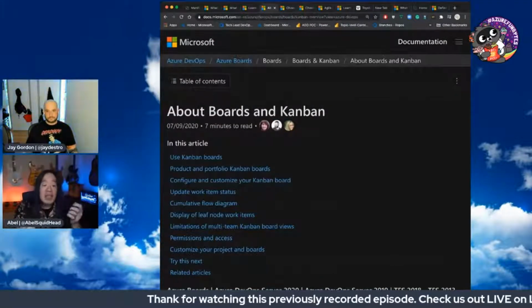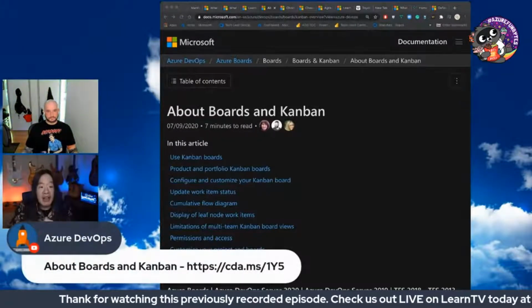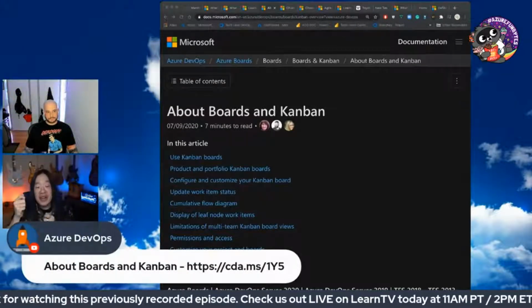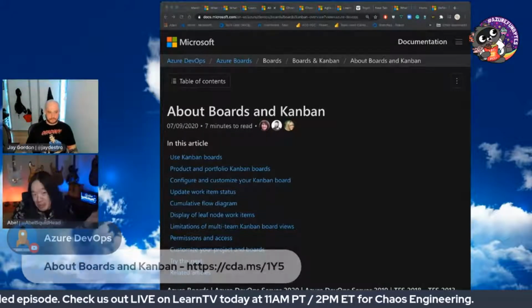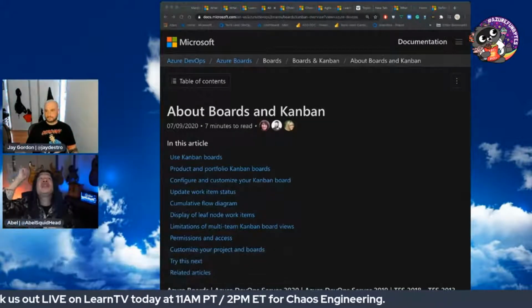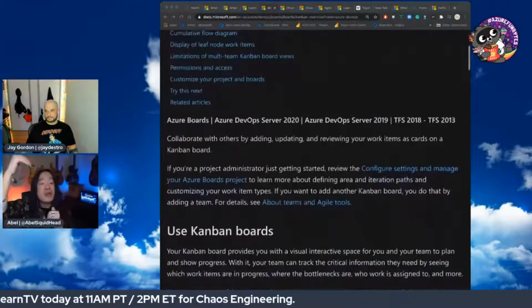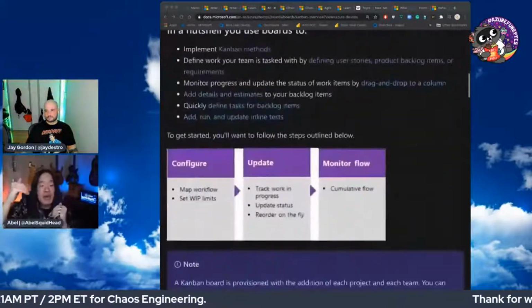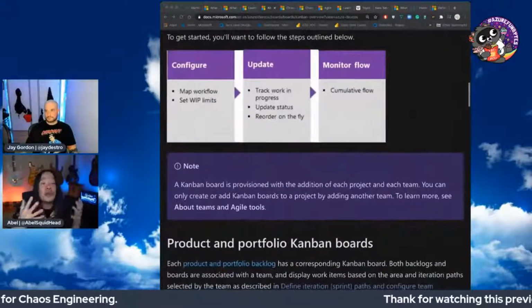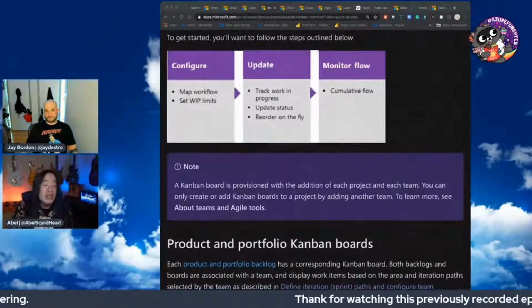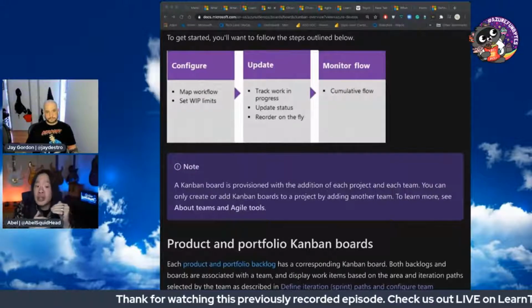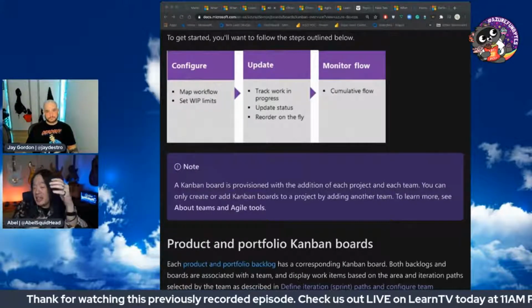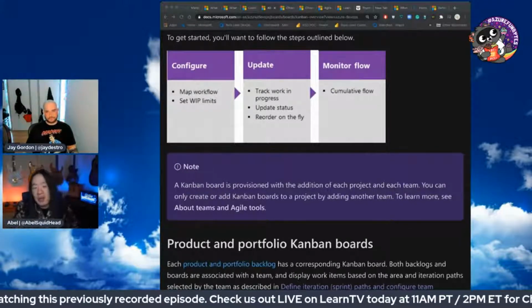And oftentimes you don't even need to prioritize the entire backlog. You just need to prioritize enough for at least 1.5 sprints maybe. And that's pretty much good enough. You just need to say these 10 items are the most important things that I think the software needs to have, because clearly within one sprint, we can't finish 10 items. So yeah, that's going to be plenty, right? So you don't need to prioritize the entire thing, but you do need to prioritize enough so that it's one sprint's worth and maybe a little bit more.